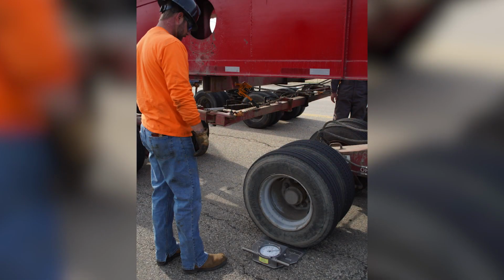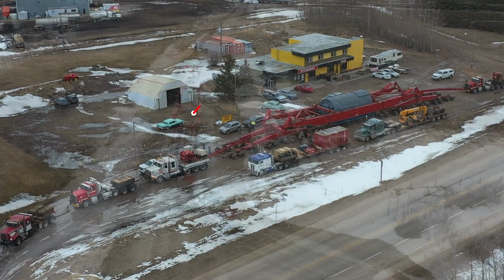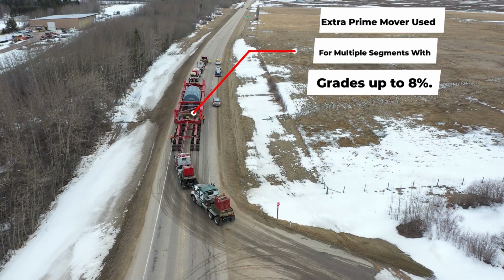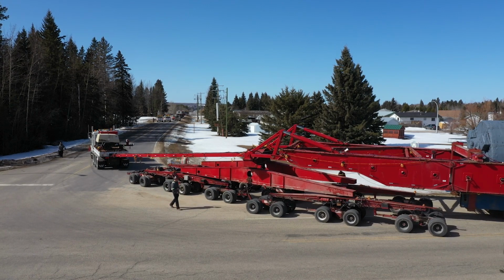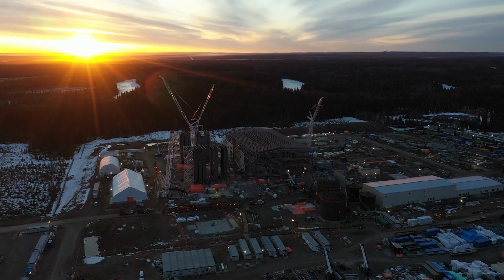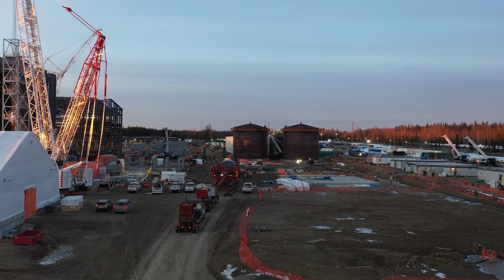To satisfy the pavement analysis complication, Barnhart negotiated a plan which included a pre-inspection pavement study before and after each haul, as well as a requirement to weigh each transporter 2 separate times during the transport route. A team of 5 engineers who traveled with the transporter inspected 93 individual 50-meter sections along the route. Barnhart delivered the first stator in 5 hauling shifts. After offload, Barnhart hauled the empty dolly transporter 270 miles back to Elk Island and began the process of loading